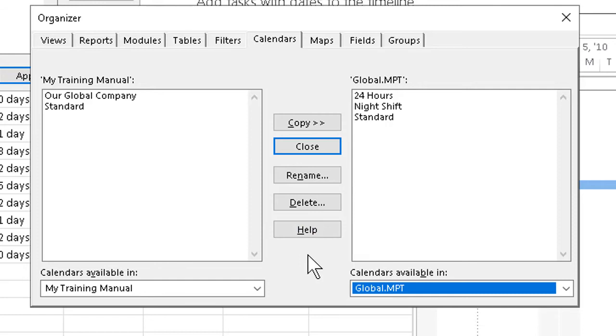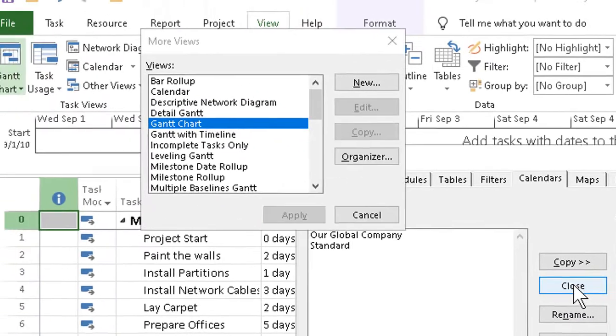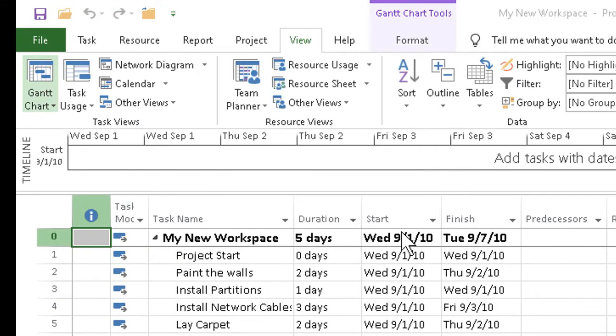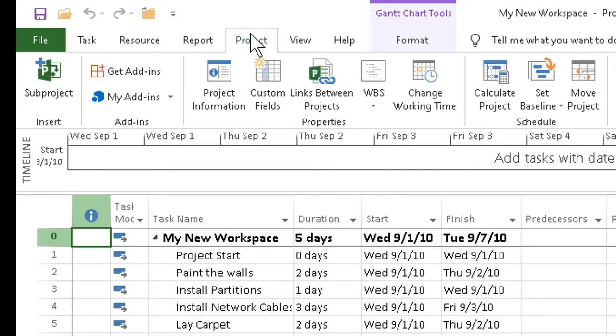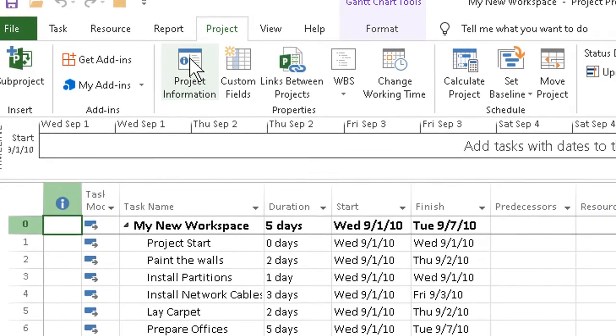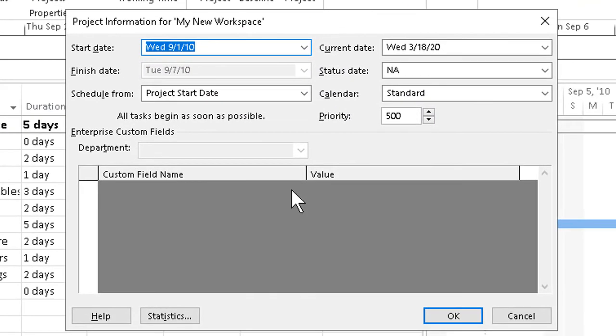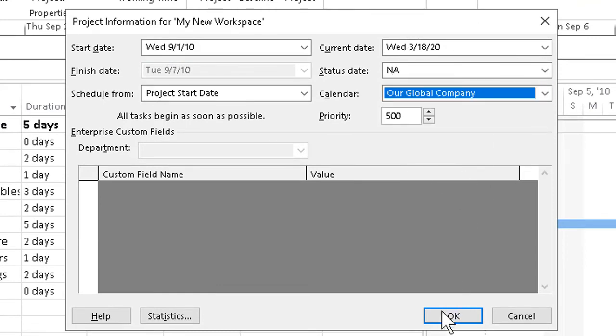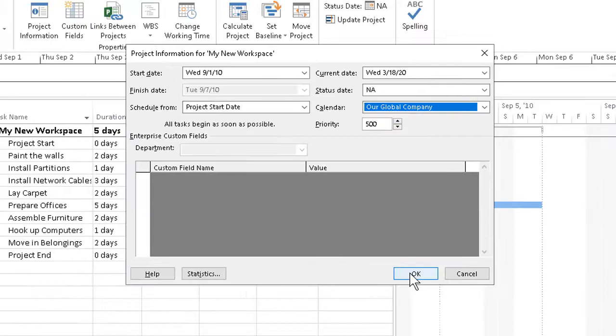Because the global.mpt is the template that Project uses for all new projects, anytime we start a new one we're ready to go immediately. We just close the box after that, we can close out of the More Views, go to the Project tab, go to Project Information, and choose the calendar we want. In this case, Our Global Company. Click OK and we're ready to go.